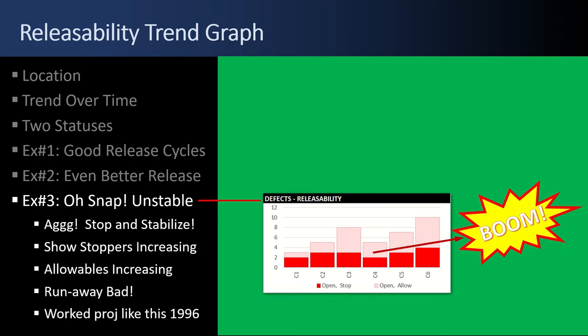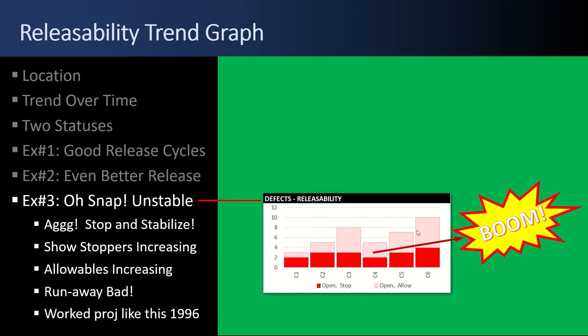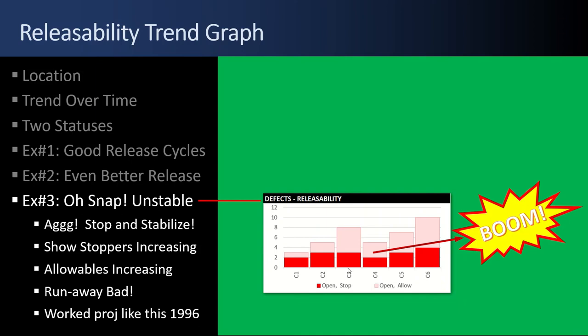Example number three, oh snap, an unstable set of test cycles. You need to, ah, look at this. It gets worse. It's a little bit better. It gets worse. You got to stop and stabilize. You can't just let it keep oscillating like that. The showstoppers are increasing. The allowable defects are increasing. If the trend of open allowables is growing and the trend of showstoppers is growing, that's really bad. That's like a runaway bad project. I worked on a project 1996 like that. It was awful. It just got worse and worse. You need to stop, stabilize the framework, stabilize the core, stabilize all the code, fix all the defects, and then you can start adding stuff.